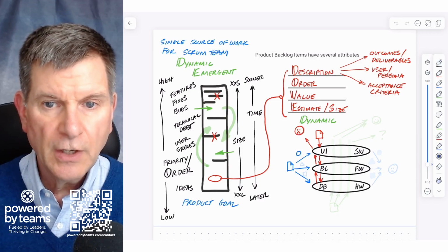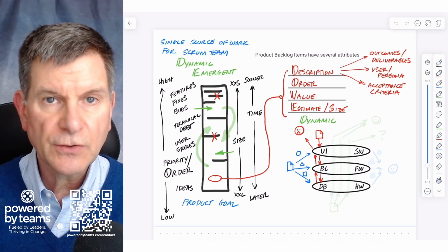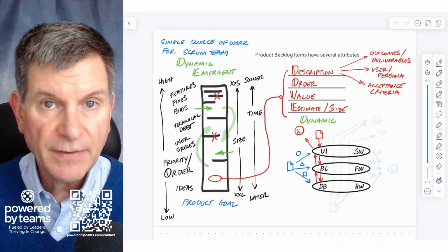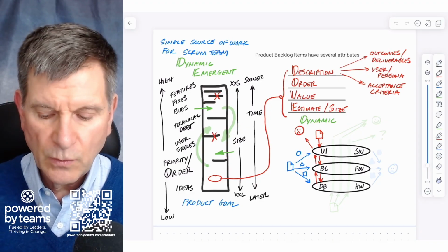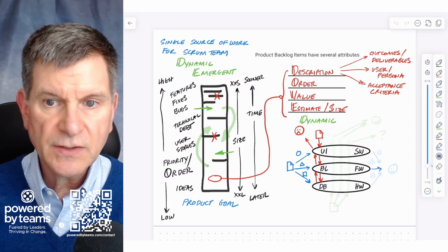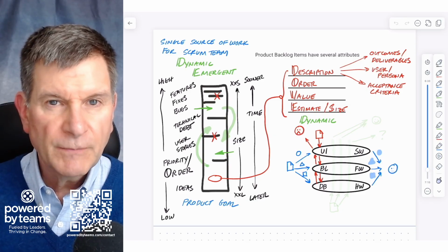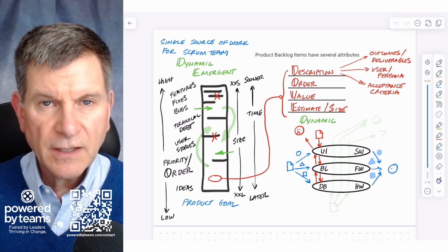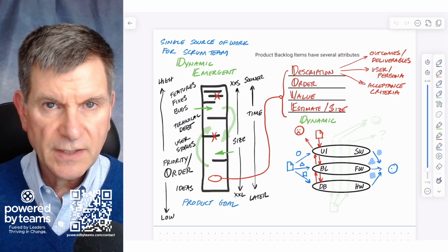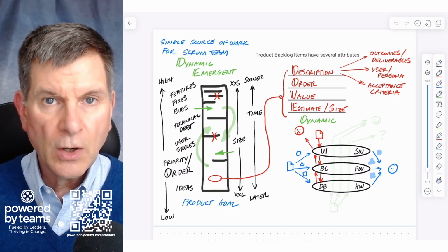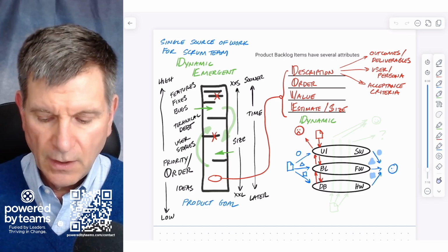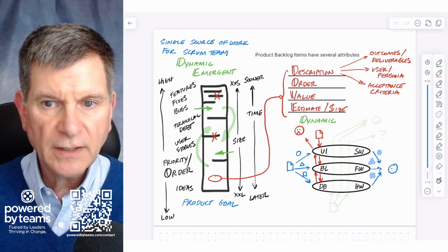Here's the challenge. When you've got component teams, circle, triangle, square, they tend to think about things only in their own way. And then you get to the end of a sprint and circle, triangle, square, now you've got to integrate things. Write this down. Anytime you defer integration, testing, or acceptance, you are accruing risk. So that way might work, might not.